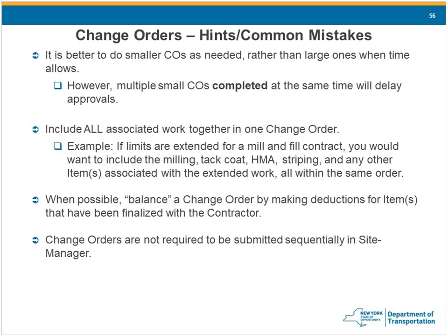Like Amy was saying, if they're going to be really close in time, like you're going to be submitting change order 1 today and then change order 2 on Friday, that might be a case where, if the change order types are compatible, you can combine them.